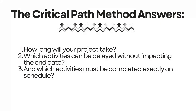Developed in the 1950s by Dupont and Remington Rand, CPM has stood the test of time because it answers three crucial questions. Firstly, how long will your project take? Secondly, which activities can be delayed without impacting the end date? And thirdly, which activities must be completed exactly on schedule?